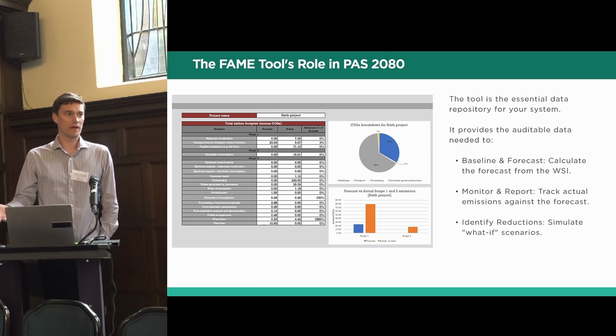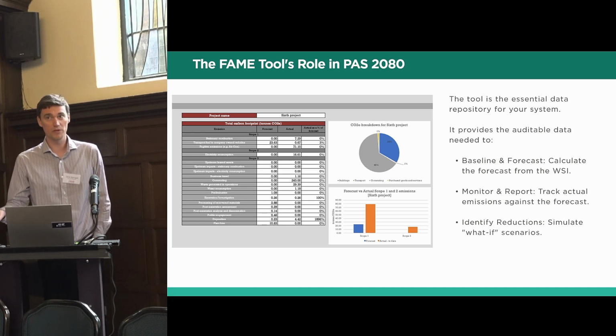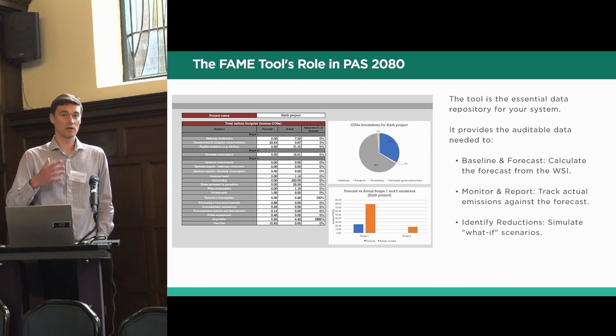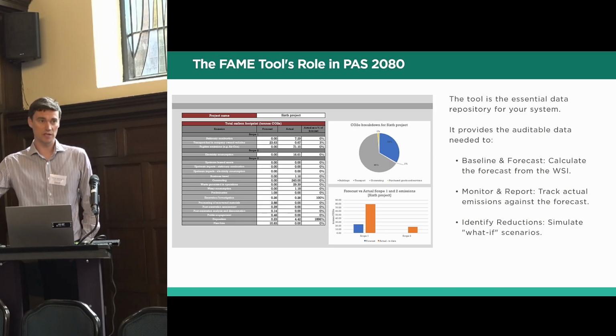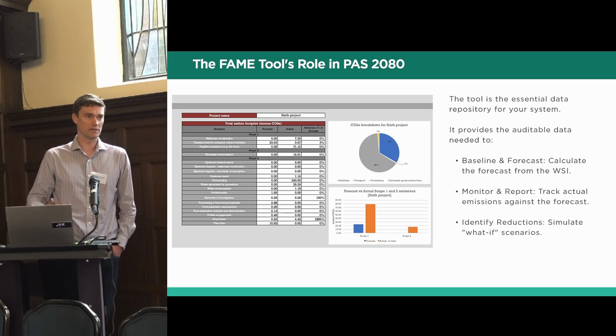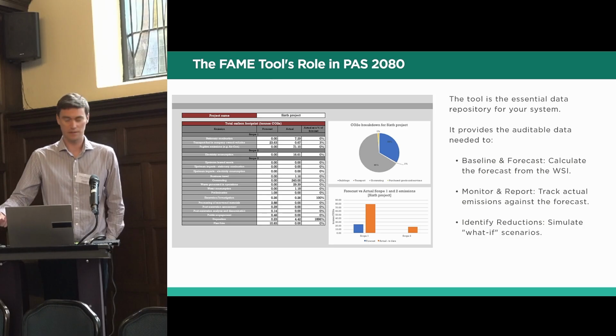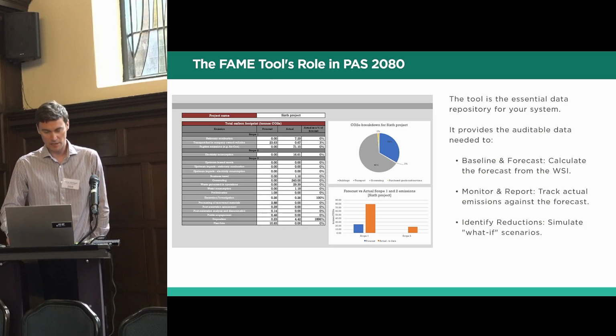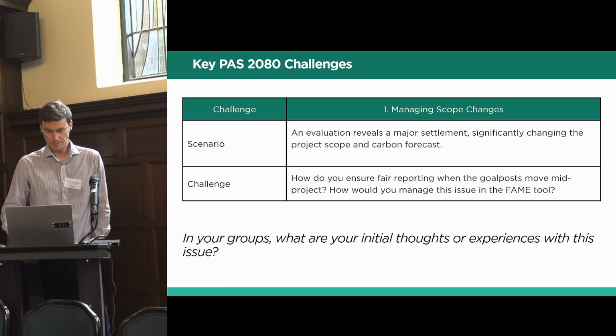But on that project, one of the carbon reduction proposals was that we'll travel there once a week, stay over locally, and then head back. So we're able to simulate what the carbon saving is quite quickly within the same tool. It takes a little bit of finesse, but it is possible.